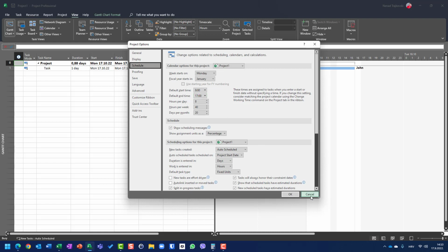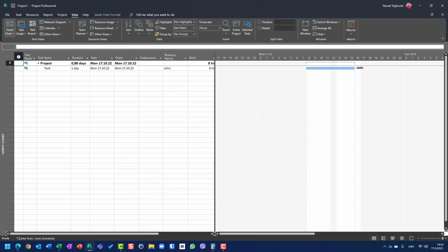But how do we have this 0.88? Let me show you that. To come to 0.88, you will see that John worked 8 hours in a 7 hour, sorry, in an 8 hour slot. So the 8 hour slot is here: from 8, 9, 10, 11, okay, 1, 2, 3, 4, 5, 6, 7, 8. The slot available is from 8 to 5 minus this break.